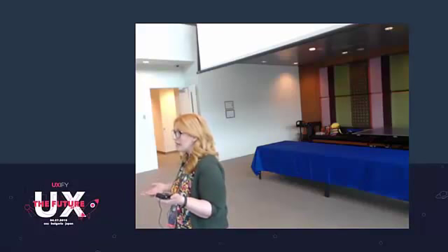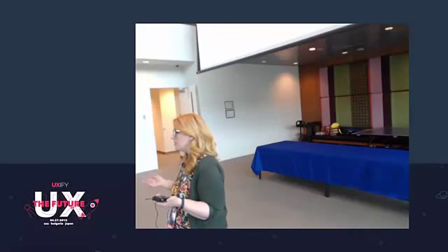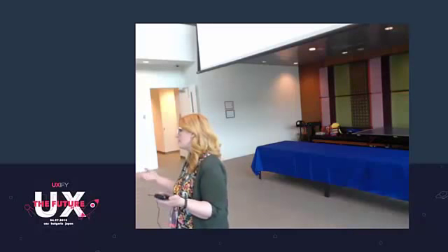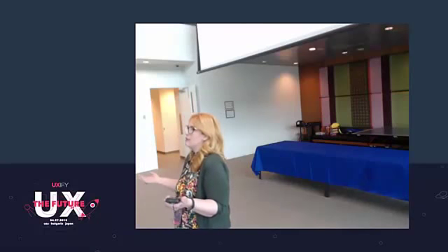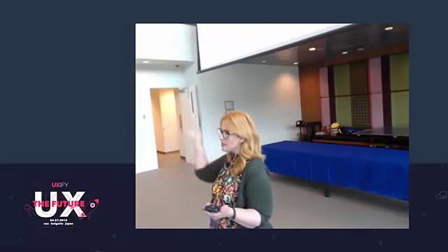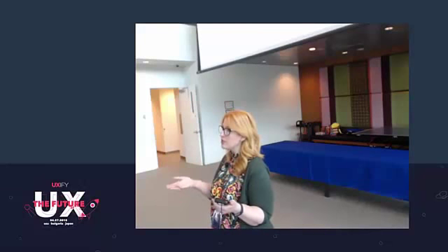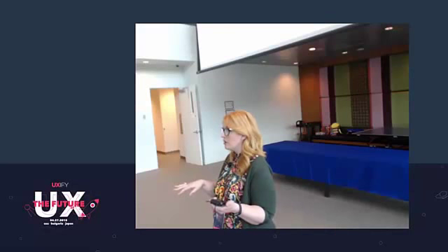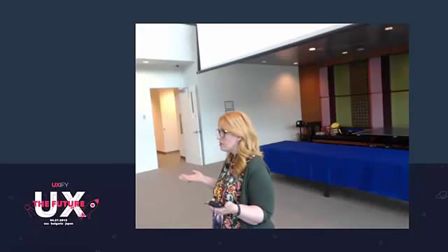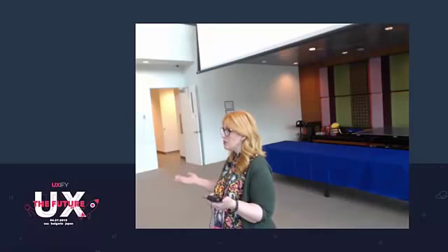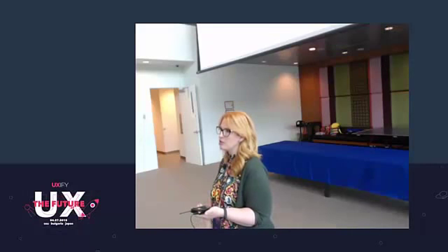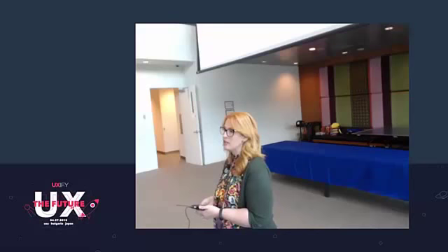We like to review that, and part of the kickoff meeting is usually the client presenting where their current state of affairs is. So we have this research, it shows these things, this is our current application that you're redesigning, or we don't have an application and this is what we need the new application to do. So that's the requirements gathering stage, which would be existing research. But ideally, around that same time, you want to try to do some user research with either existing users of their current application or people who would be using the thing that they're going to build if it doesn't exist yet. So it's all right at the beginning of the project that you'd want to gain that research in the requirements gathering stage.